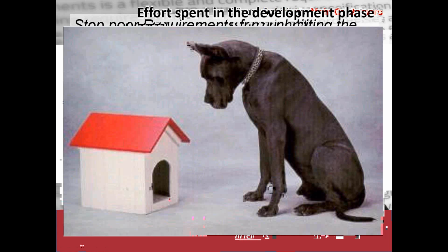So we have to take into account that QA is not only testing, but it's also about requirements. Even if we pass the tests, that doesn't mean that we are delivering the product or the project that was ordered by the customer. We have to be sure that all the customer requirements were gathered and are in the project, and also that we get all the correct requirements that the customer is asking for. So we must spend some extra time and some extra money in this development phase.